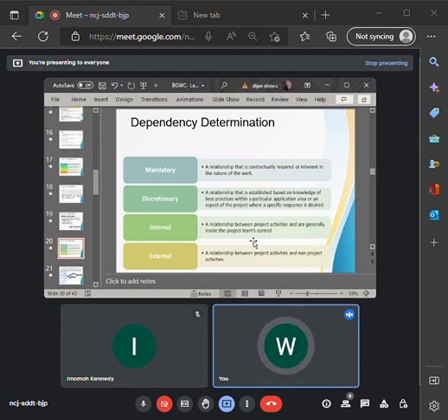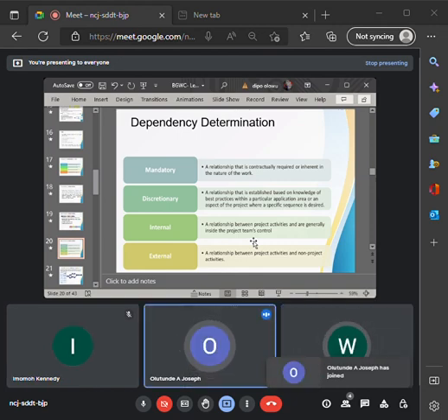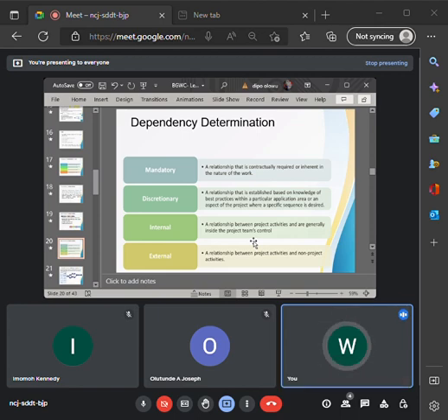So the internal team members become a reason for sequencing the project. For example, internal dependency: maybe Kunle, who is supposed to do task A, is not available at the moment, maybe because he needs to go for his uncle's burial, or he needs to do his wedding. We can't say let's stop the project. Then the project manager considers Kunle, who will go for the wedding, and says, okay, why will Kunle not be around? He's going for a wedding. Okay, let Wale carry out this other task. So which means Wale's task will come first before Kunle's task.